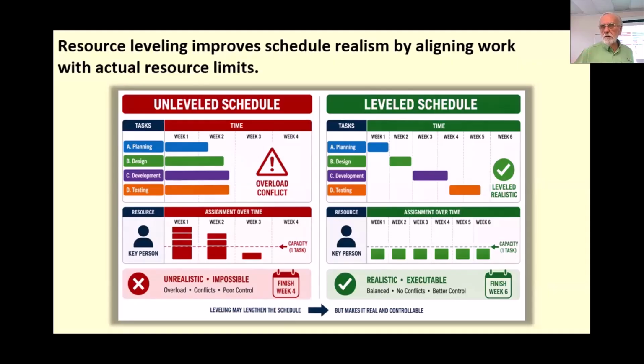So this connects to planning, because we can resource level kind of in real time. Once the schedule is in the baseline, and we've done our planning, now we can go in and look at what's really happening. So maybe that 50% utilization was optimistic. Especially if you're working in a matrixed environment where you don't have direct control over people's activity assignments, it might be that person's manager has assigned them to another project, and now all of a sudden they're working on 2 projects, right? And I'm going to tell you, 50% of somebody or 50% of 2 people never equals 100% of 1 person, right? You better have 1 person on it.